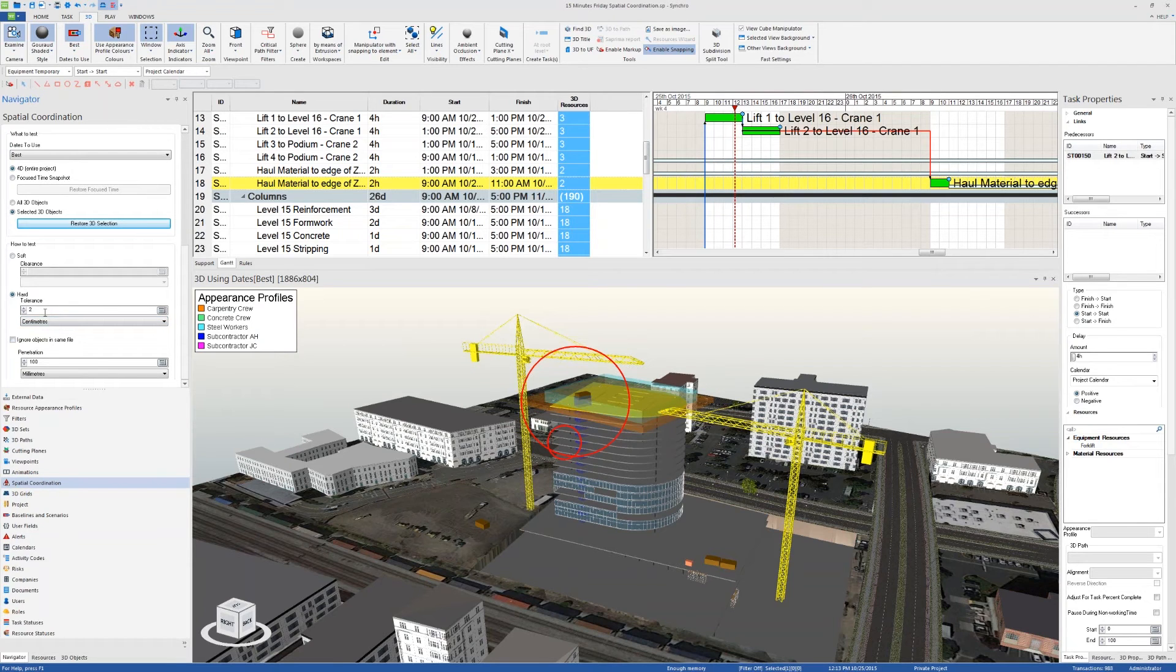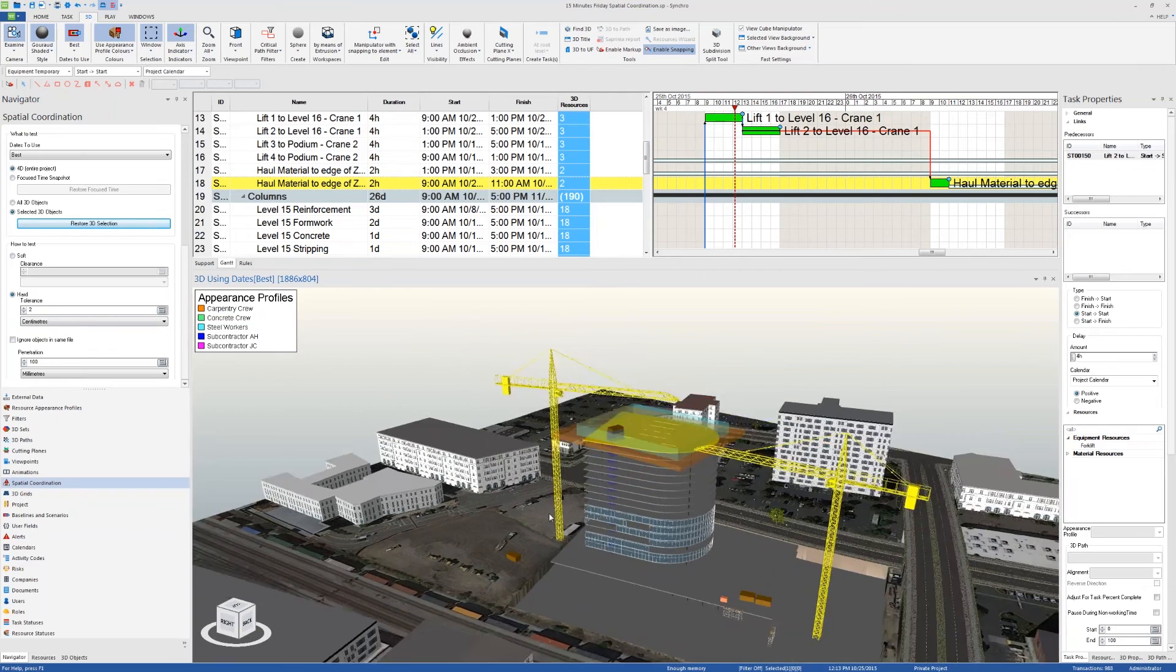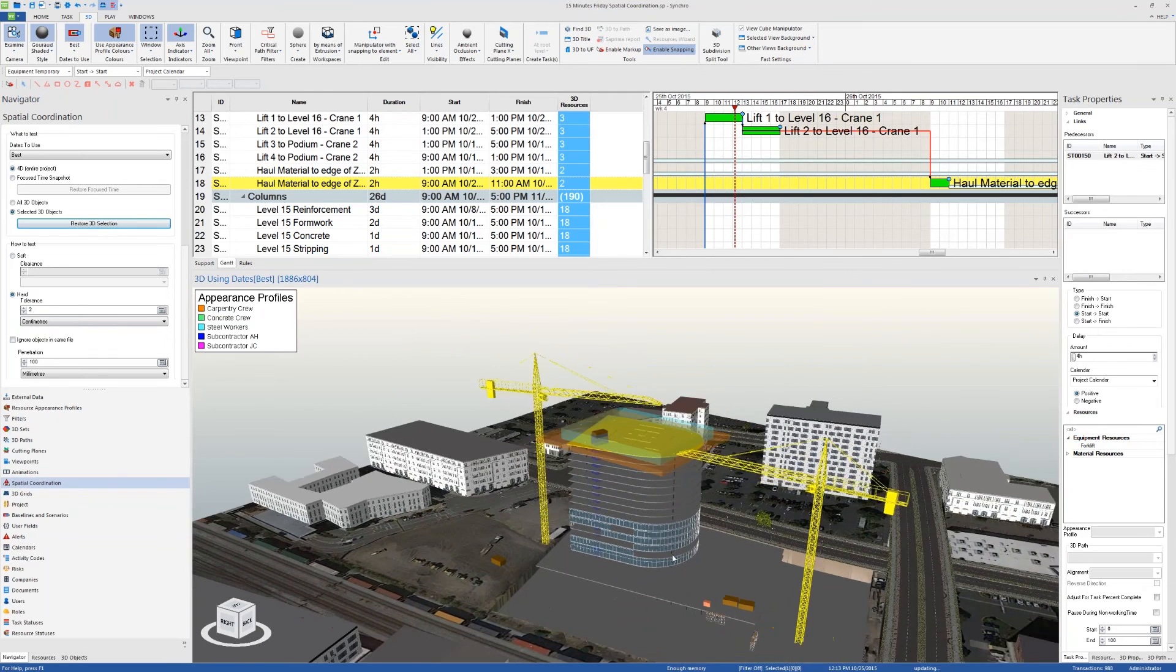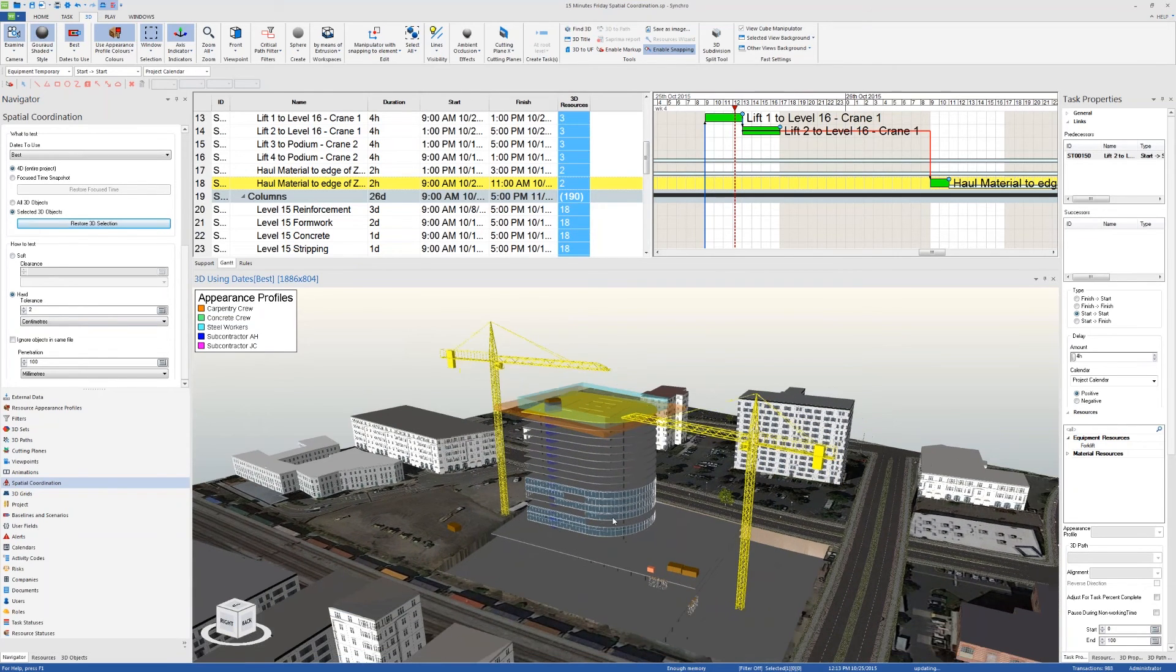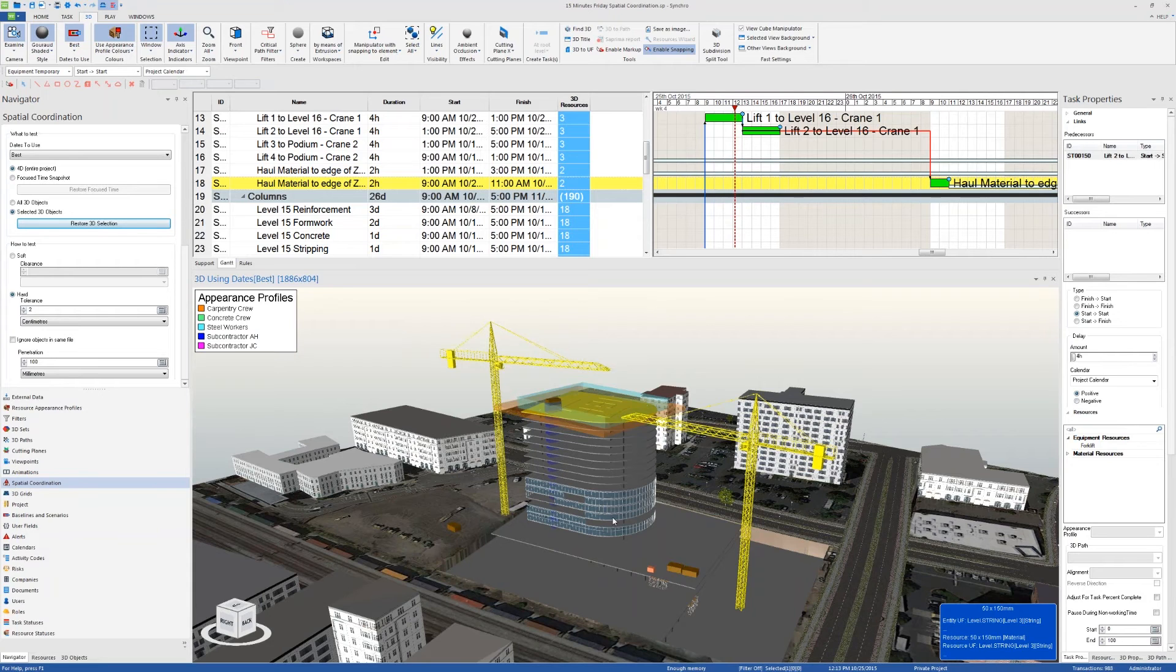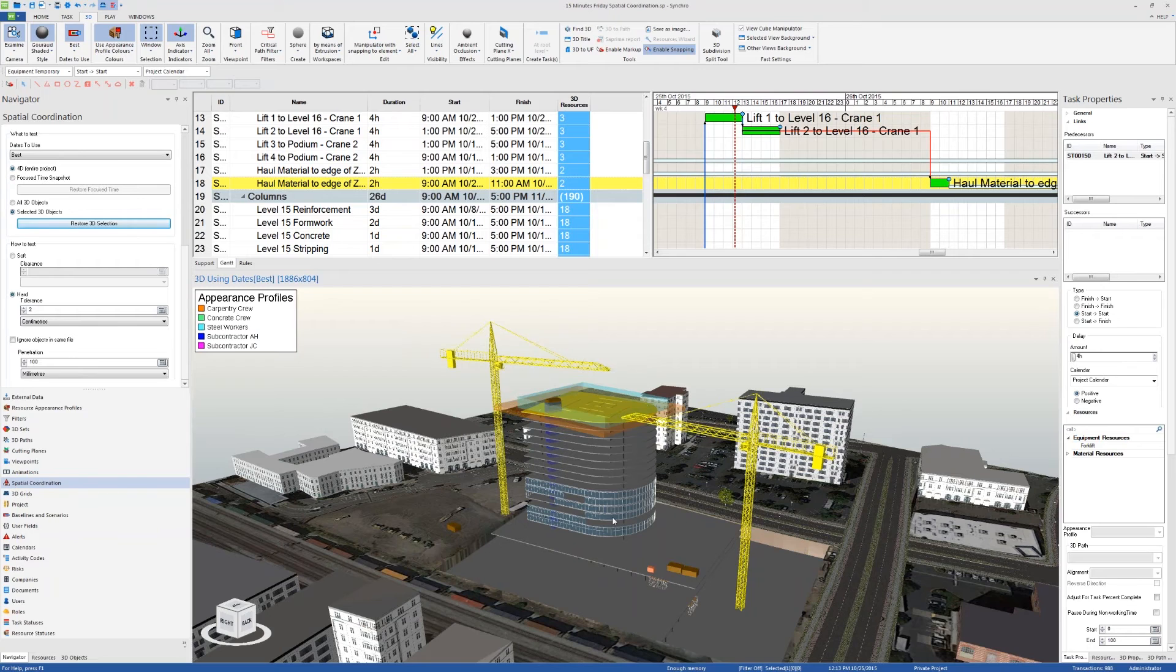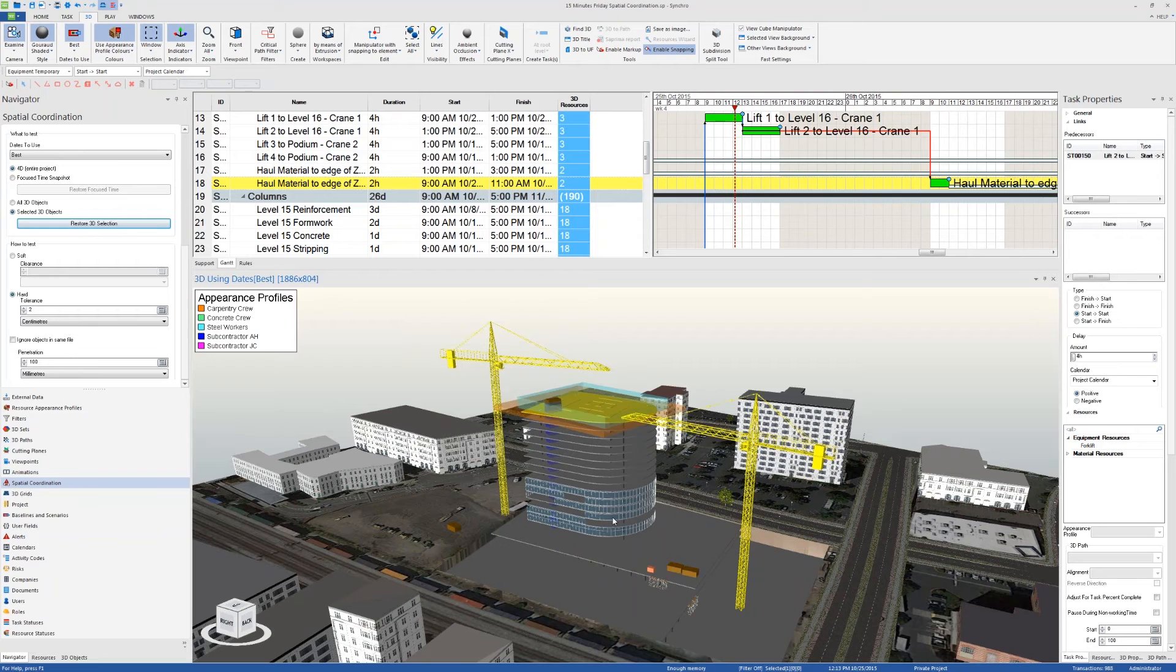Okay, one more question. What's the difference between clash detection in Synchro and clash detection in Navisworks? Clash detection in Navisworks is used more to find design clashes. The tests that are run in Navisworks are more for 3D objects and to change the design. But in Synchro, you run clash detection for workspaces and some 3D objects like equipment, but you're not going to be changing the design as much. You're going to be changing your schedule or your construction plan to avoid these clashes. So in summary, Navisworks clashes are more for design changes, and Synchro clash detections are more for construction schedule changes.